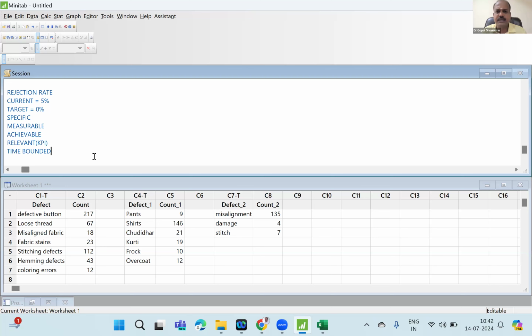Maybe you can even give a specific date, nothing wrong. But always in a Six Sigma project, there will be uncertainties. The timeline may slightly change, the budget may slightly change. This understanding is important. Normally, a project manager may not be able to understand all of this, but if you are managing a Six Sigma project, you should know. You might say 3 months, but the project may run for 4 months. You might say a budget of 12 lakhs, it may go to 14 lakhs. These are all possible. Why? Because we are dealing with a complex problem where the uncertainties are many. We are exploring uncertainties.